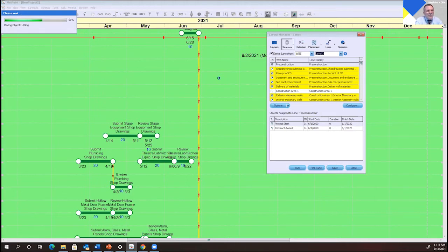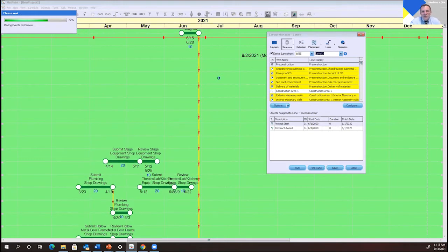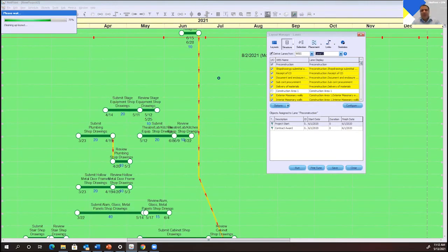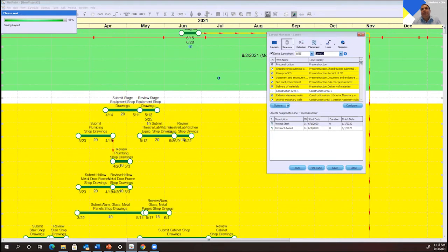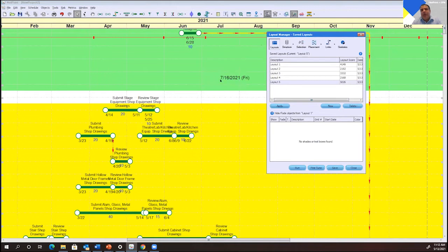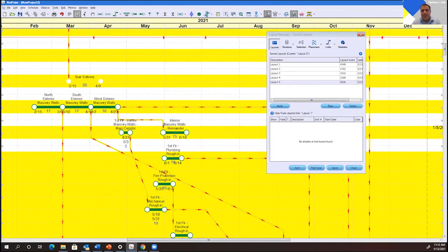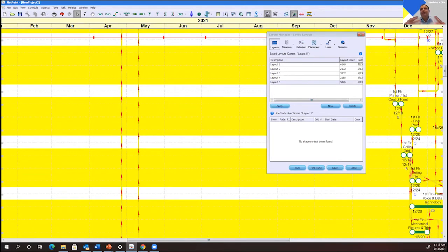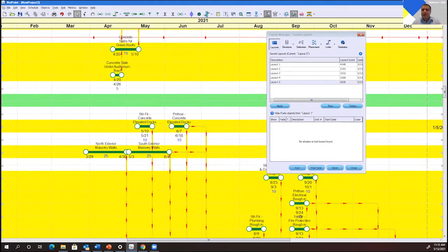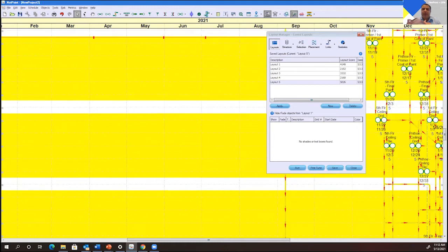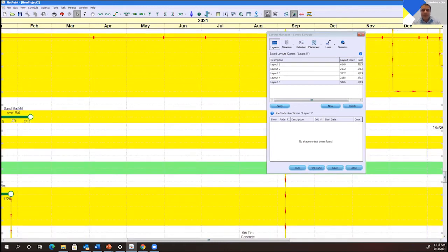So you can see how it's running through, and maybe while this is finishing up, you could just give people a little bit of an insight into algorithmically how you and the team figured out how to do this. Yeah, so the basic idea in this algorithm is removing or minimizing clashes. Basically the algorithm puts a penalty for every clash that it identifies. So overall, the system is trying to minimize the total sum penalty that it sees. So it becomes more of an optimization problem at that point.